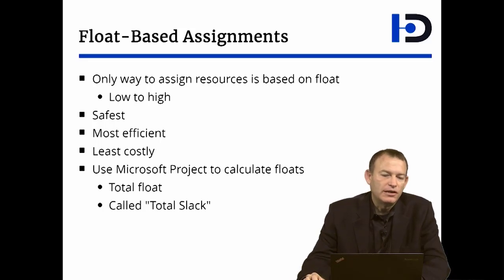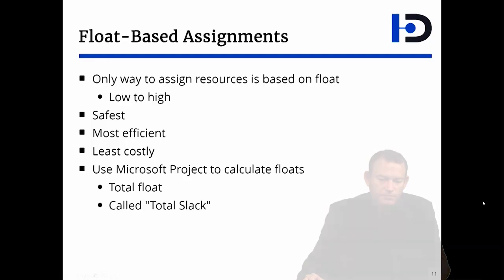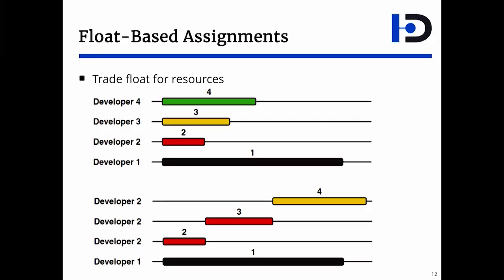In the demo, I will just rename it to float just because. The idea is very simple. All activities in the project have some level of float, but not all activities have the same amount of float. The least amount of float is, of course, the critical activities.